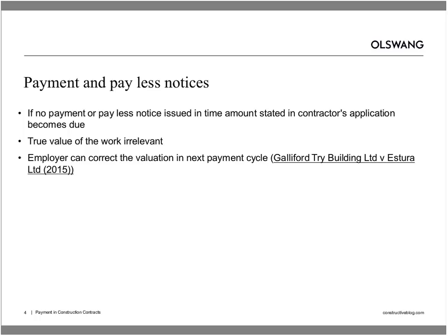And in those cases where the employer has then sought to start a second adjudication to try and determine the true value of the works, the courts in ISG and CVIC and in other decisions have made it clear that that second decision will not be enforceable. So effectively, the employer is stuck with the overpayment, at least in the current payment period.